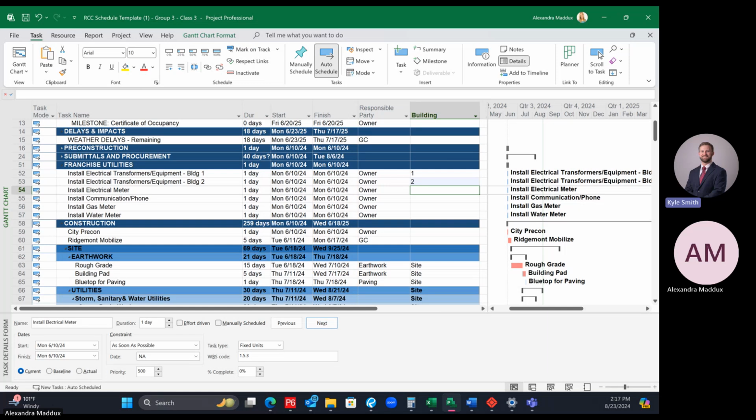But you know what I'm talking about. For some responsible parties I had 5 different subs on one long item for all 5. If I filtered by sub 1, it would show that too. If you have it as a resource, it would probably let you do that, because you can select multiple resources on one activity.